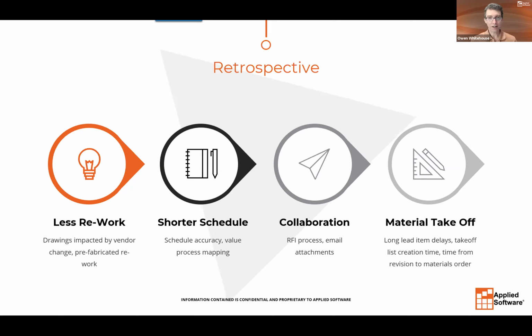Despite the fact that everything finished, quote unquote, on schedule, so the client had signed off on multiple revisions to the baseline schedule, the reality is when you sat down and did your initial baseline schedule and then failed to meet that, for whatever reason, whether it was a scope change or invalid vendor information, we've got to be honest here and say my baseline is my baseline is my baseline.